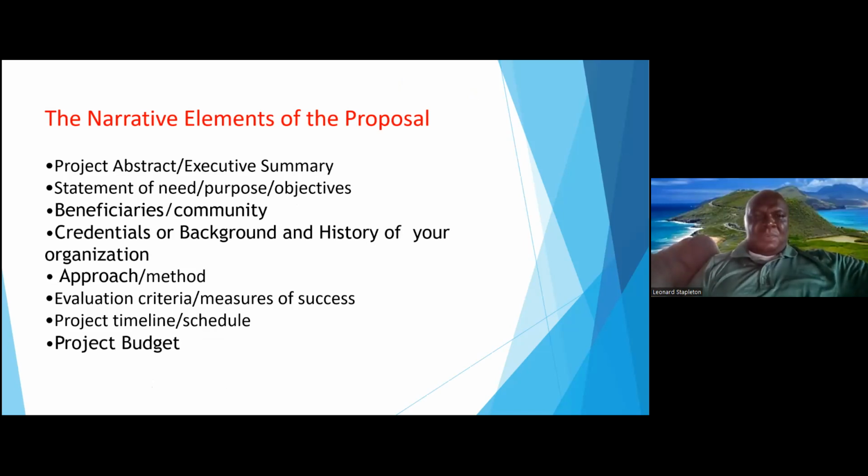When you do the budget though, you need to get assurances from whoever is giving you the estimates that this is the price they're quoting, that's the price you're going to get it for. Even after, because these days with inflation, you have the prices of items changing very fast and going up.